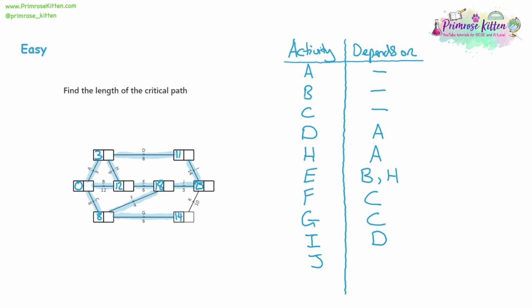Now the 18, again, you look at the number of arrows going into the box. So we've got the E arrow, and we've got the F arrow. So I'm not just going to put E because that's the one that actually gives us 18, because F gives us 12 instead. It's going to be a result of both. So we do include both of them.